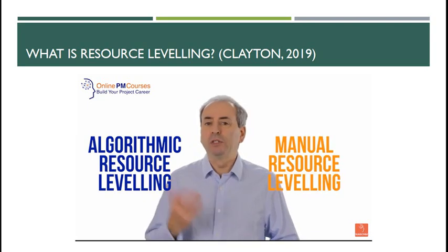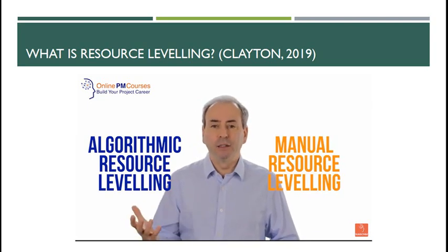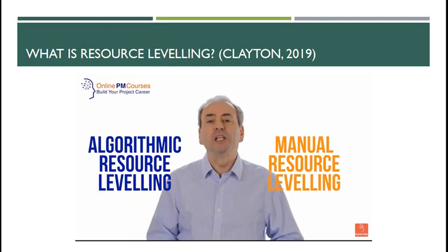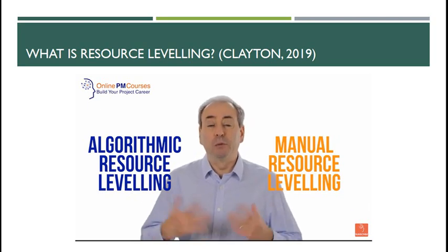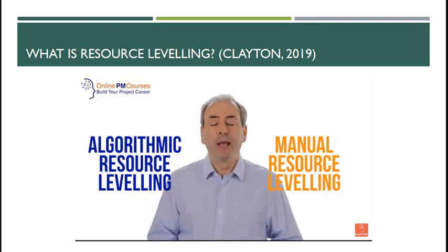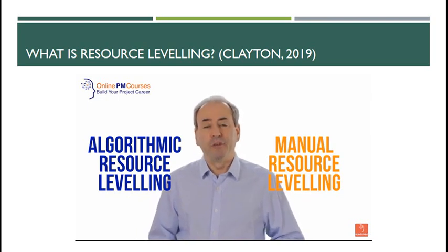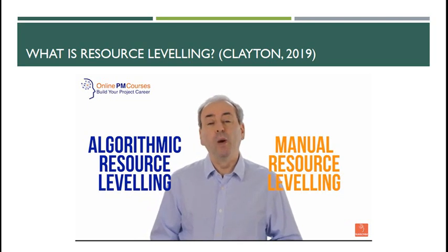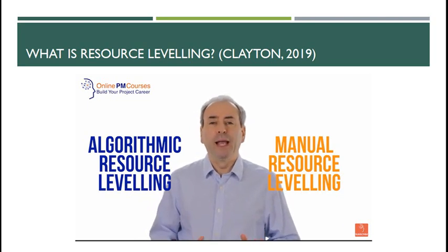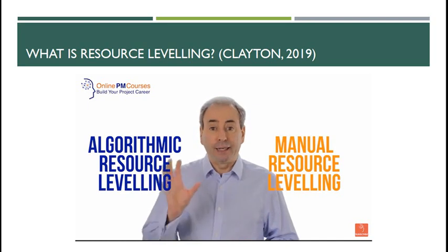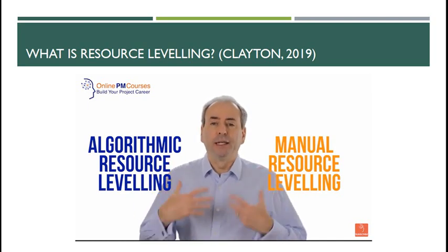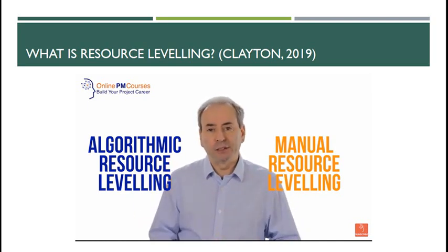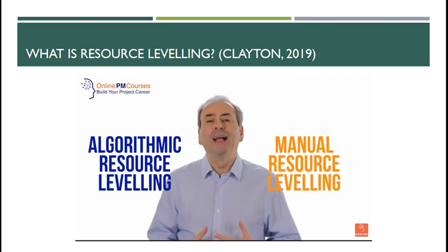And I would say that automated resource smoothing is ideal when you have large numbers of tasks and large numbers of resources that would make it complex at best to do it by hand. However, manual resource leveling and resource smoothing as well is ideal where it is hard to articulate clear skills, clear requirements for each of the tasks, but you've got those in your head.